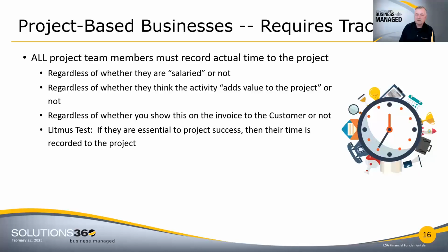So all project teams must record actual time to the project. Doesn't matter if you're salary or hourly. If you spend an hour on a project, record an hour to the project. Doesn't matter if you think the activity adds value or not. If you spend time on the project, record time. I've had project managers tell me over the years, oh, that's just an administrative activity, I can't charge that to the project. Well, I'm paying you to manage that project. And if what is needed is an administrative hour, then you have to charge that administrative hour to the project. And so we have to understand all the costs that go into it. The litmus test is, if I can't do this project without that person or that piece of equipment, then my time is recorded to the project.